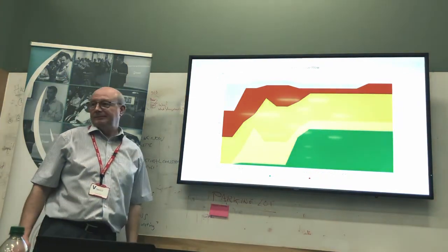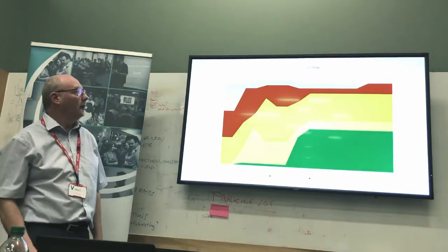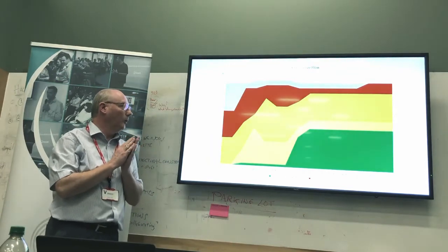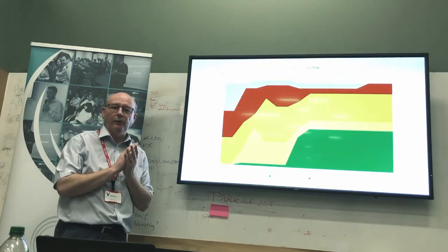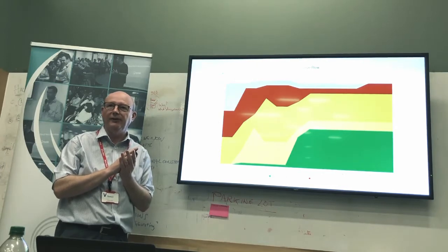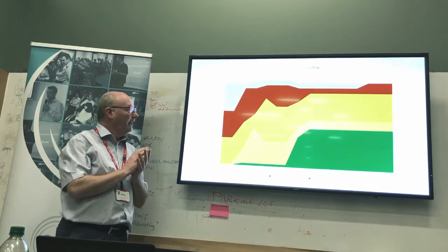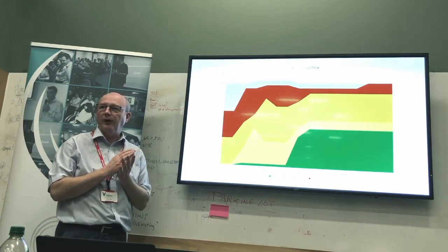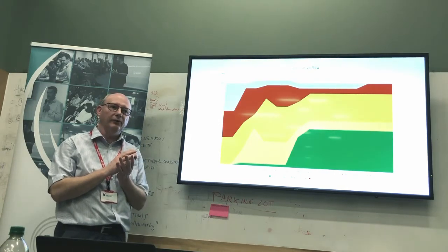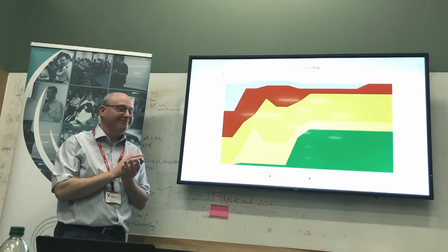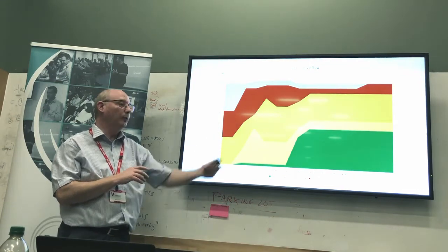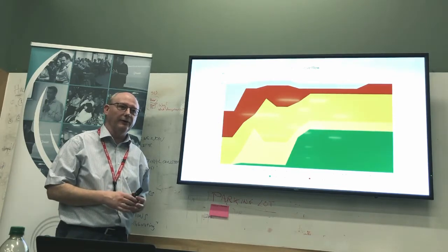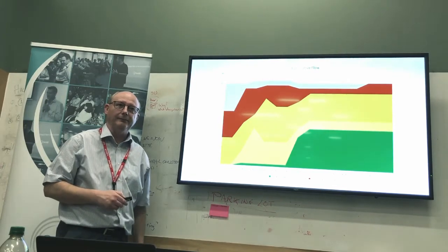Trying to pick up and remember where you were, I guess. Sort of. Yeah. What I have observed over quite a few cumulative flows is that when you interrupt a sprint, the effect of the interruption generally lasts about twice as long as the actual interruption. So we had 4 days of incident and 4 days of, well, probably talking about the incident and getting ready for the witch hunt that was going to happen later.